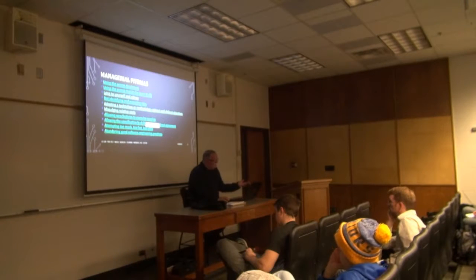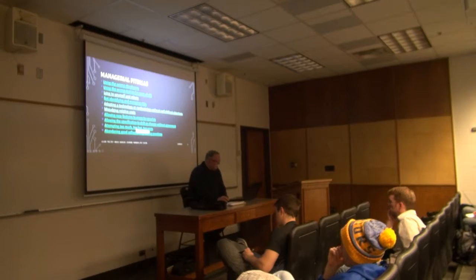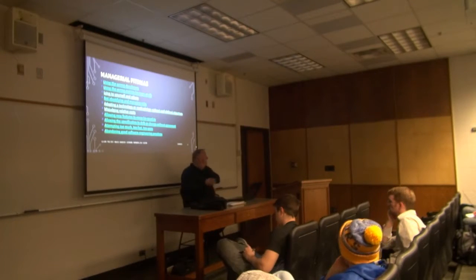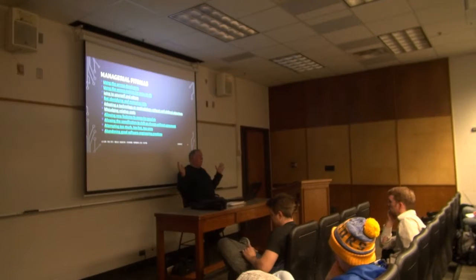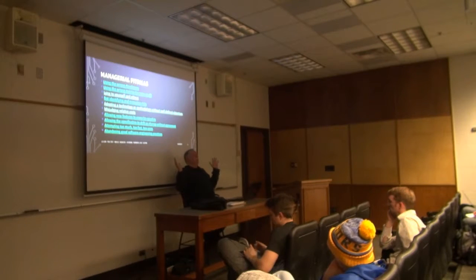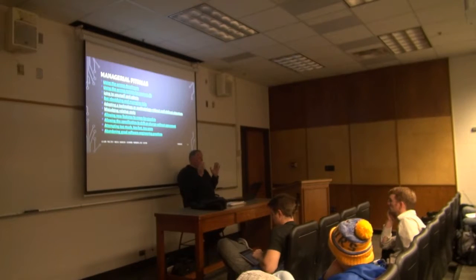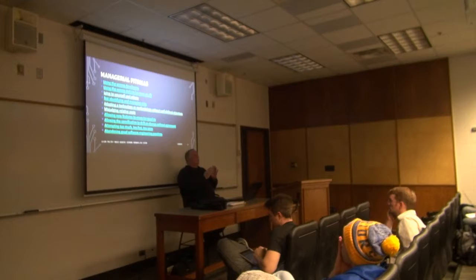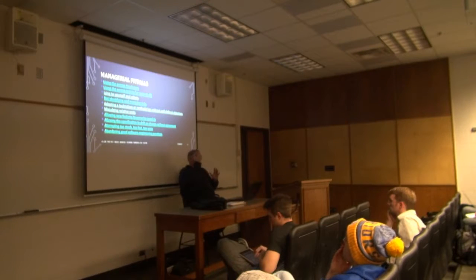Allowing new features to creep or pour in, we've talked about this ad infinitum. This is the requirements. Attempting too much, too fast, too soon. If you're adopting a new technology or management, do a pilot project. Do a pilot project. You want to make sure you know how it works, that you actually have success with it.